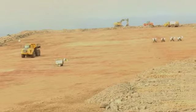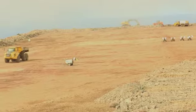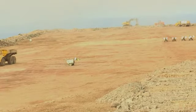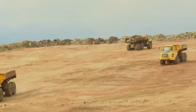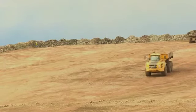We're standing on the center line of the runway. It's just to my left, your right. It's about chainage 1950. It's another 200 meters where the concrete of the end of the runway will stop. But the dry gut fill behind me on my left here is 92% complete. It's just over 7 million cubic meters in. Another 600 and a little bit to go. 40 days from now we'll be done. The 27th of August is the planned date to be finished. We have to be finished by the 6th of September.